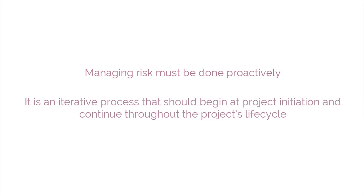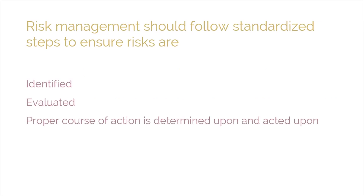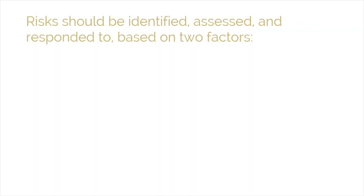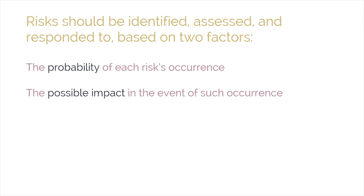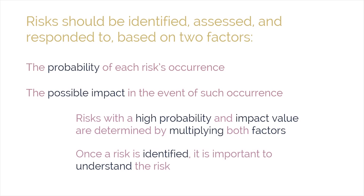Managing risk must be done proactively. It is an iterative process that should begin at project initiation and continue throughout the project's lifecycle. The process of managing risks should follow standardized steps to ensure that risks are identified, evaluated, and that a proper course of action is determined and acted upon. Risks should be assessed based on two factors: the probability of each risk's occurrence and the possible impact. Risks with high probability and impact value — determined by multiplying both factors — should be addressed before those with a lower value.